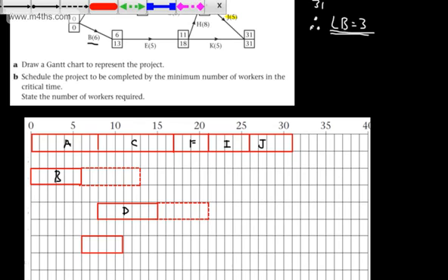So just a bit of a recap in terms of our activity network. This tells me that E cannot start until B has been completed. And we call that a dependency, or if you like, it will come from a precedence table. So let's take this out now, and that looks to be 18, and we'll drop this down and then go across. So I've now put on my float, and I can label this up, and that is going to be E. So E is done.